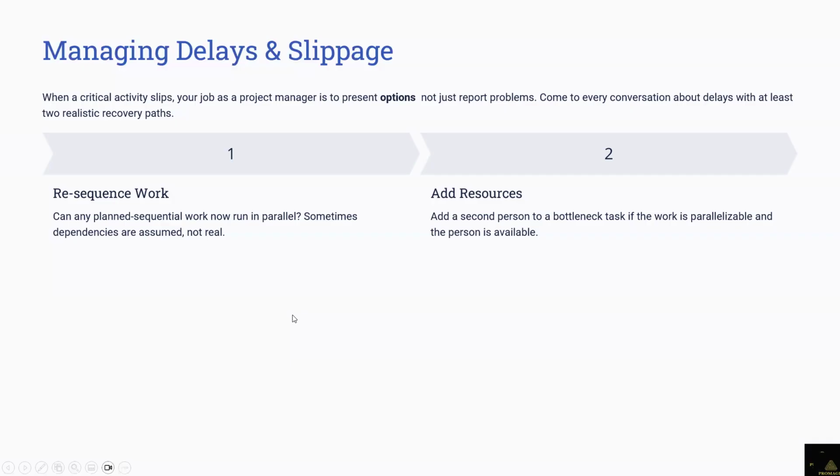Once an activity that's on a critical path is impacted, you need to sit down. And when I say sit down, if it's a project you are knowledgeable about, you can quickly look at things. Even looking at your schedule, you can start asking questions. Can we move this particular activity forward, or can it be done in parallel? You'll be talking to your team, especially the technical people. You let them know straight away, hey, based on the schedule, we are not going to finish. Is there anything we can do? Everybody sees the true picture, and they can come up with suggestions on how things can be fast tracked.